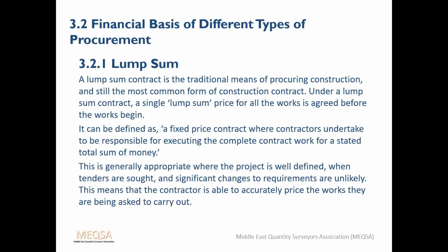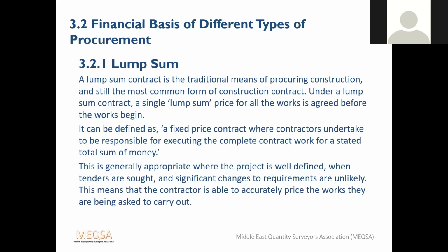This is generally appropriate where the project is well defined when tenders are sought, and significant changes to requirements are unlikely. And this means the contractor is able to accurately price the works they've been asked to carry out.